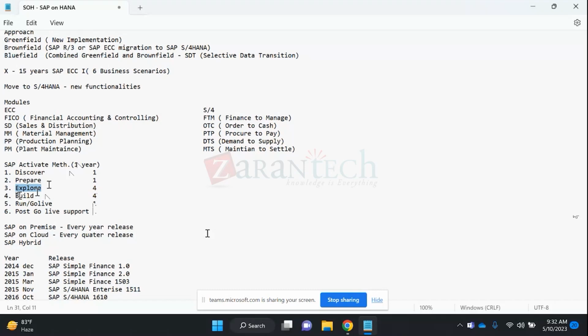Before starting any configuration in the SAP system, we should take a sign-off from the business in mail, or their sign-off in the document, because that business blueprint document is my main document. Based on that, I go ahead with the required configuration. There might be some gaps in the explore phase, because the customer says I want this functionality, but as a service provider we can say this is not possible in the standard way. But yes, we can work around it, and there's a gap here.